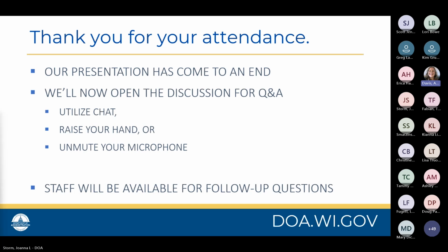Another question was asked, can the fees for construction administration, post-construction, final bid documents, and bidding be paid with CDBG grant, or do they have to use their own funds? And the response there is in the chat. Generally, yes. Most of those costs can typically qualify as eligible CDBG costs and may be considered construction costs typically. However, you should contact your DECR project representative to verify specific items are eligible, and we would also look to see if any of them are subject to competitive procurement, and if so, were the competitive procurement processes followed.